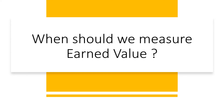When should we measure earned value? Iteration boundaries are well defined to calculate agile EVM. It can be done more often, which is applicable for a release that contains only a few iterations. EVM has been proven to be statistically accurate as early as when 50% of the planned features are completed, which makes agile EVM an important metric to report to your stakeholders. The important consideration is that you have the correct cumulative values available at the boundaries you choose to calculate your agile EVM.